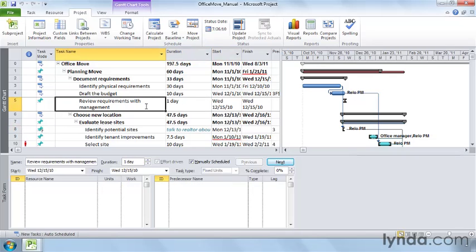In some cases, tasks have to occur on specific dates, like meetings, training classes, and conferences. Those tasks start whether you're ready or not. You can type the dates in the start or finish fields of a manually scheduled task, and that's when the task is scheduled. This approach is also an easy way for a beginner to start managing projects.